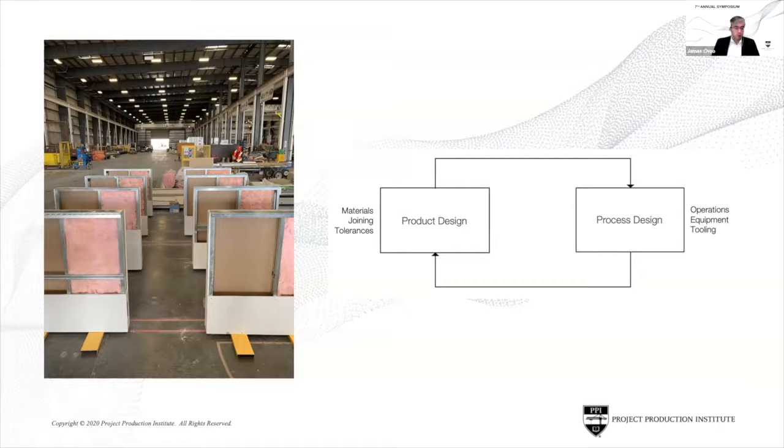Can you also talk about the supply chain implications? Sure. One of the great pictures that floated around internally was a picture of Home Depot, which is a big box retailer for us for building supplies. Their entire drywall inventory at any given point in their store was the equivalent of 2 days' worth of our production.